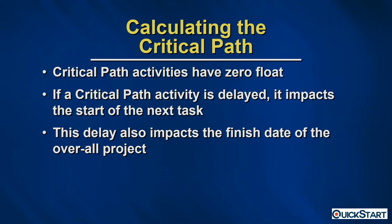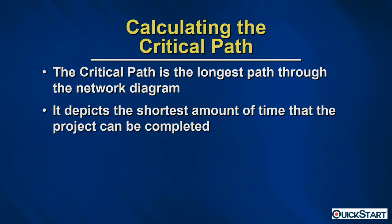More importantly, calculating float helps us identify the tasks on the critical path. Critical path activities have zero float. The reason critical path tasks are so important is that any task on the critical path that gets delayed will impact the start of the next task and the overall project finish date. The critical path is the longest path through your network diagram and represents the shortest time in which your project could be completed.